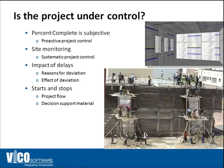Gantt charts are difficult to use in the field for monitoring construction. Typically the schedule is updated once a month to record what happened in the past as opposed to help you forecast where problems might occur in the future.